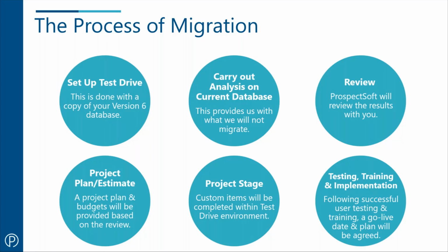Clearly, there will be some differences between customers and how long this process itself will take. But once we start the test drive process, depending on how large the project stage is, we should be looking at a month, at minimum a month, before you can actually migrate. But again, we can work those timescales out with you, alongside your thoughts on when you want to go live with the Prospect 365 solution.